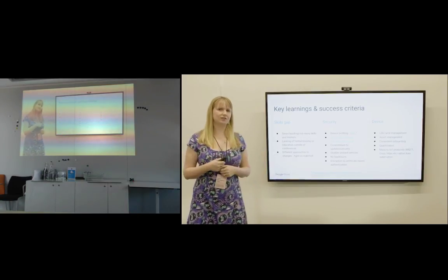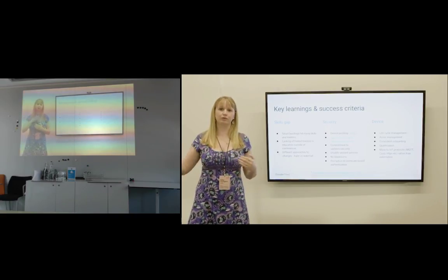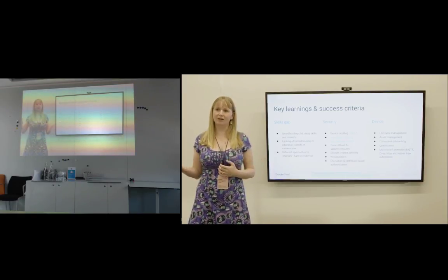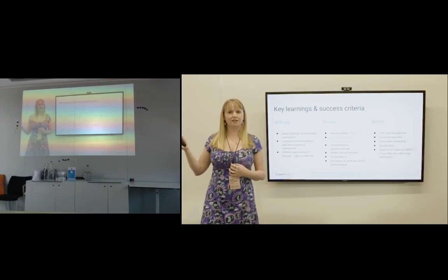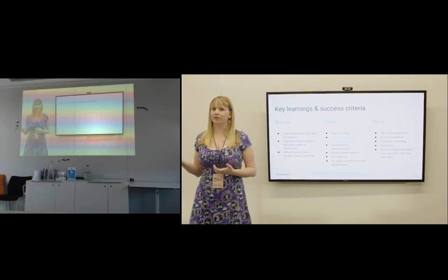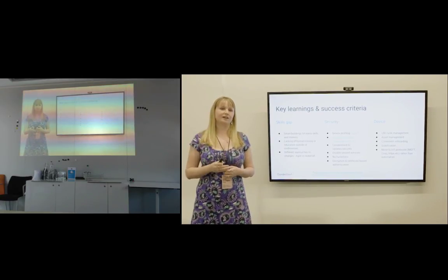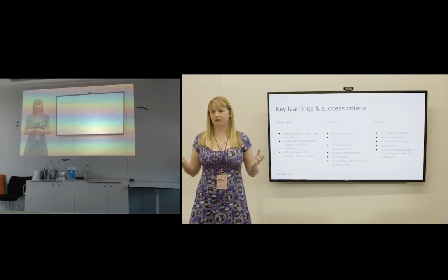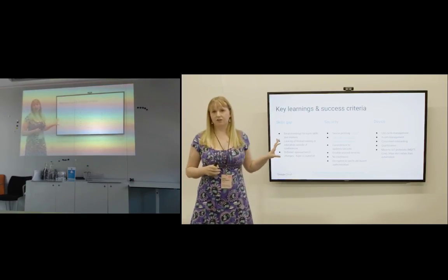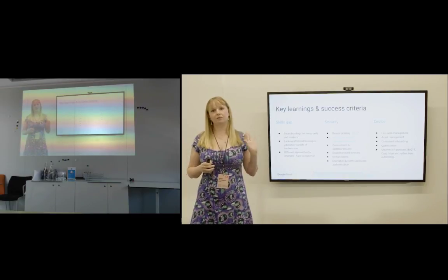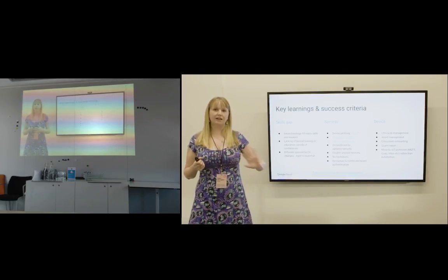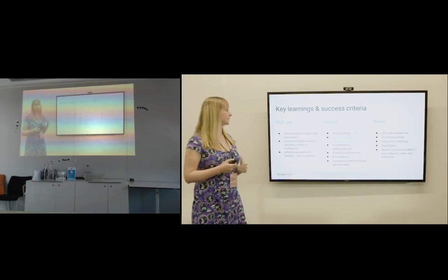And the second is the construction industry is built and designed on a waterfall type method of program management. So you design something 5 years or whatever before you actually deploy it. And in that case, that means that a lot of your systems and your devices are locked in 5 years before. And if you go to any software developer and say, your software has to be exactly the same in 5 years, you're going to get laughed at, because that's just not how the industry works. So working out ways of moving the selection of devices, any sensing, monitoring or control, back into later in the construction program is key to hitting this.